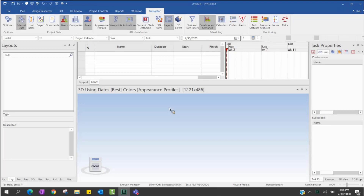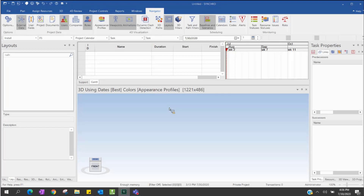On this session, I want to bring a topic about the baseline and about some explanation about the synchronization for the schedule. The baseline in Synchro means we will take a snapshot for our task property. Why do we need to have a baseline in Synchro? It's just like a normal planning software. When we want to optimize our schedule, before we change the schedule, we will do a baseline, so we have a reference of what is before and after.